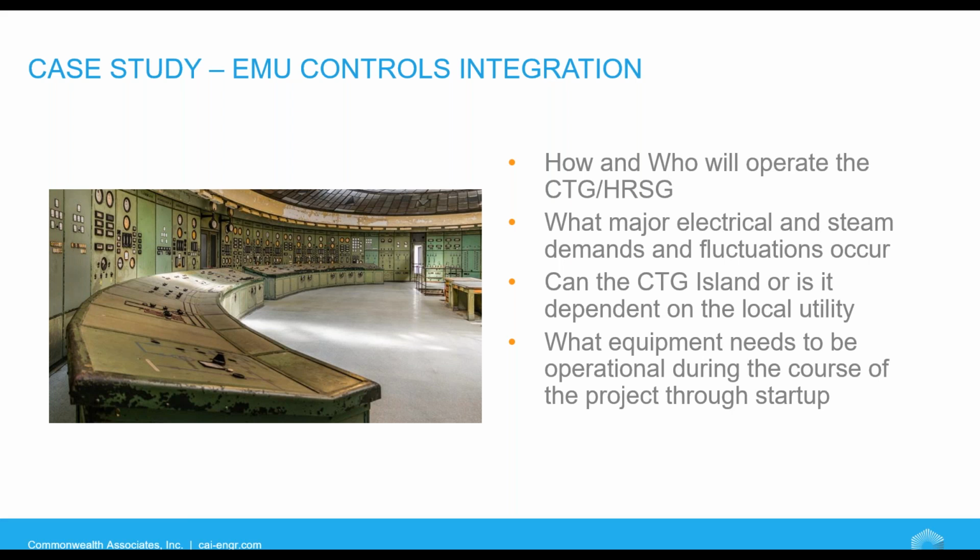Incremental changes to the existing system, or a transfer from an old system to a new one after sufficient testing, is always prudent. So this goes back to the understanding that campuses cannot be shut down. Factories do not have long outages. The more pre-planning and engineering that can be done with flexibility during construction will lead to a successful project.